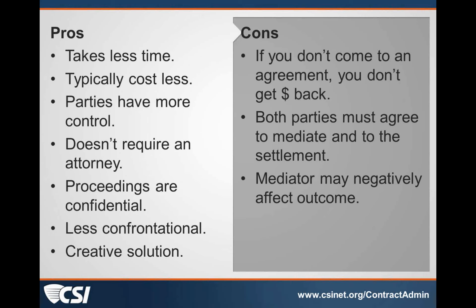It doesn't have to be a one side wins and one side loses. It's compromises, or if you do this, I'll do that. So you can come up with some different creative solutions. Some cons: once you go through the process, if you don't come out with an outcome, you've paid that cost and you've got nothing for it. So you don't get your money back if you don't come to an agreement.